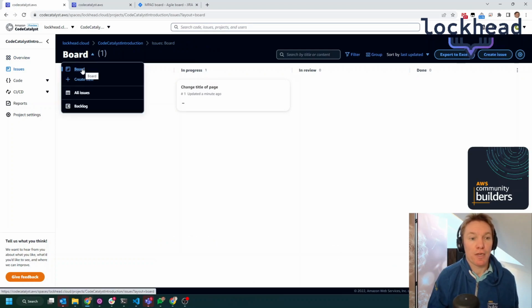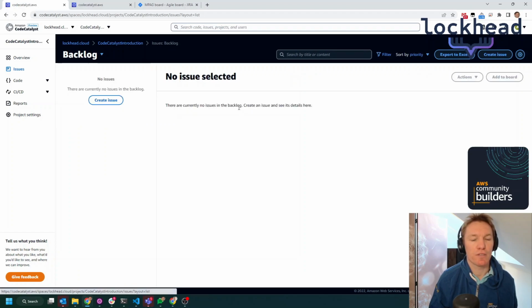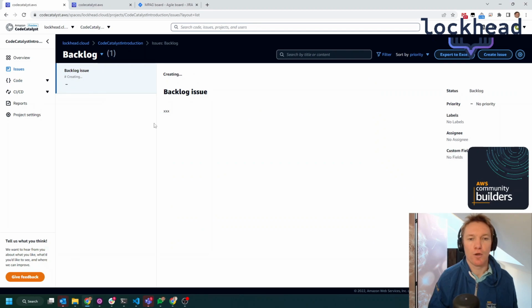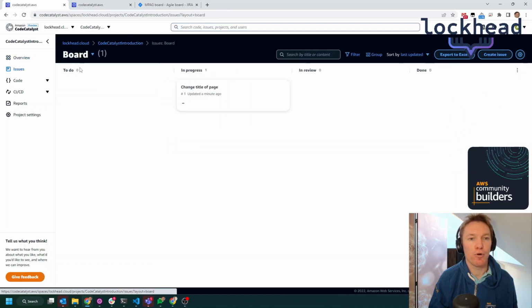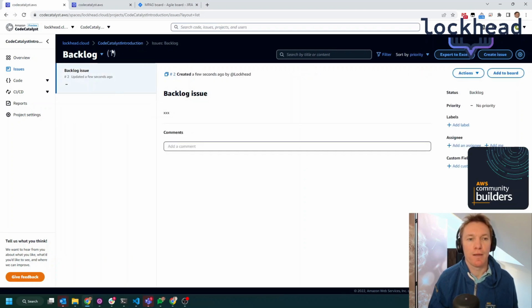The backlog is something that you can access over here. So you can just click on the arrow and then you will see the backlog. Let's create an issue in the backlog, and we can create it over here, which will now mean that we are not going to see it in the board. So if I go over here, it's not going to be visible, but it is going to be visible in the backlog over here.